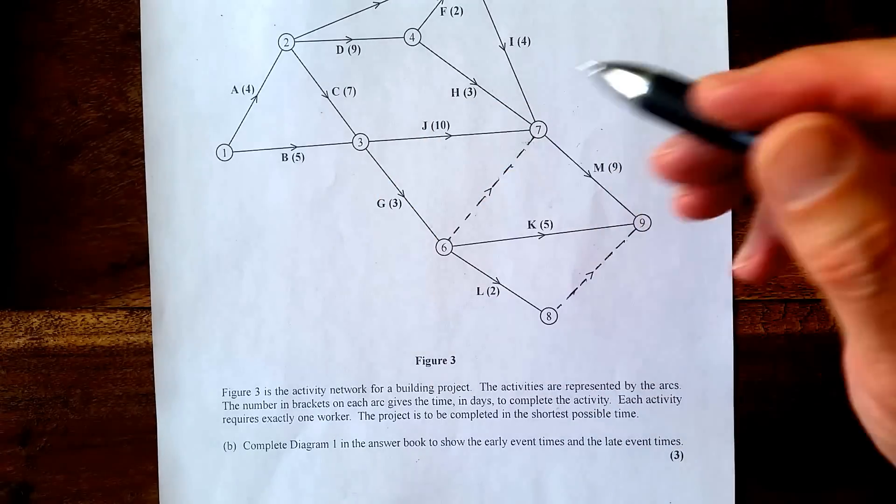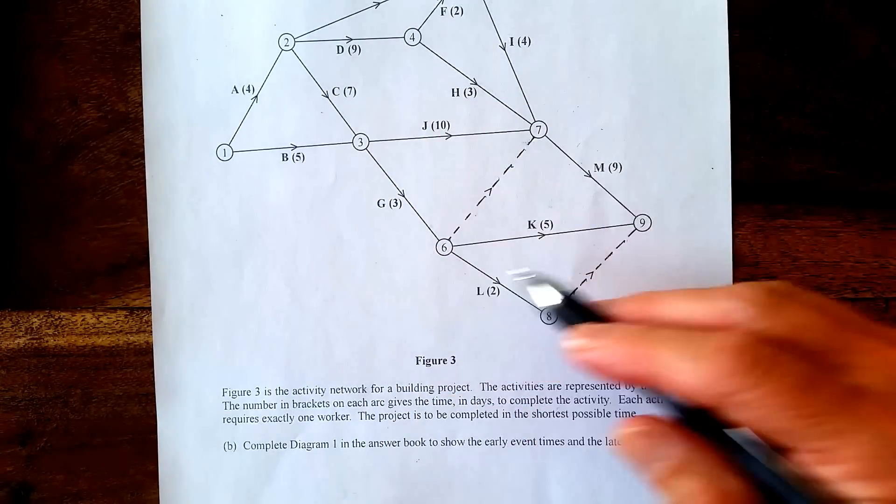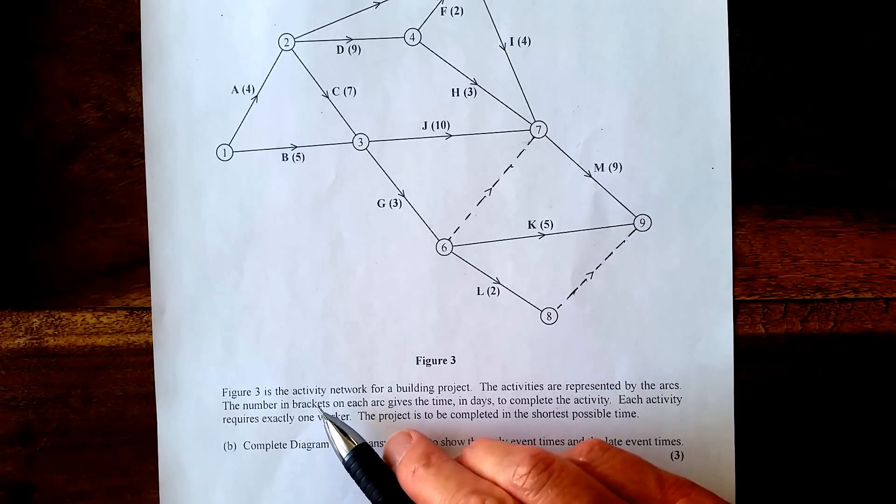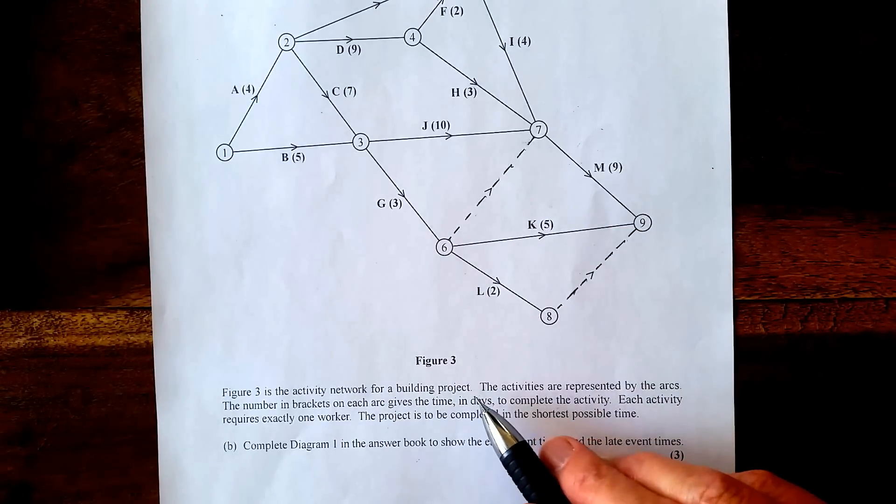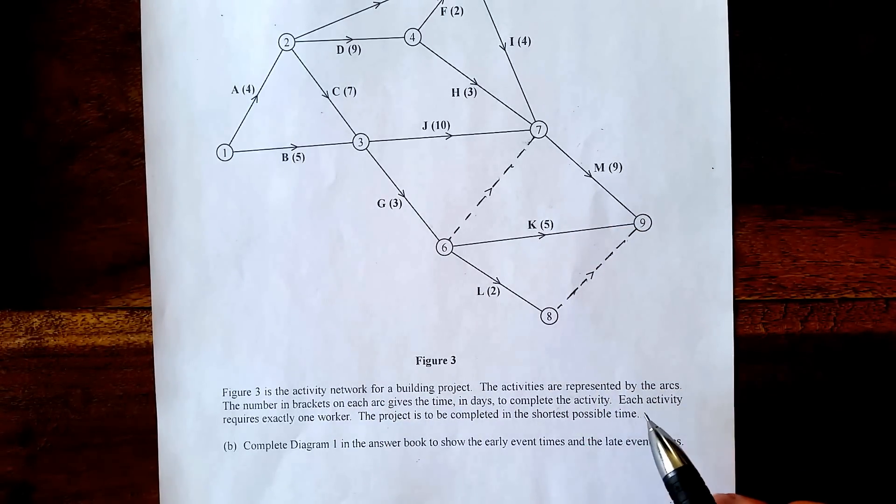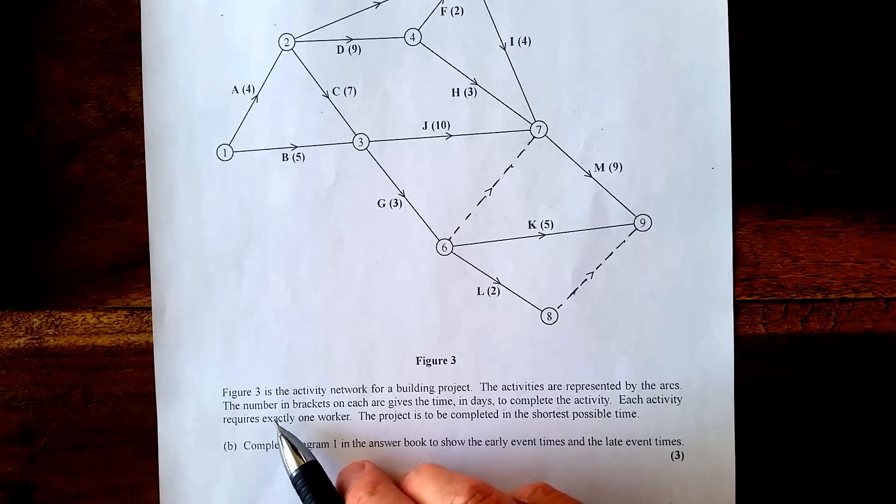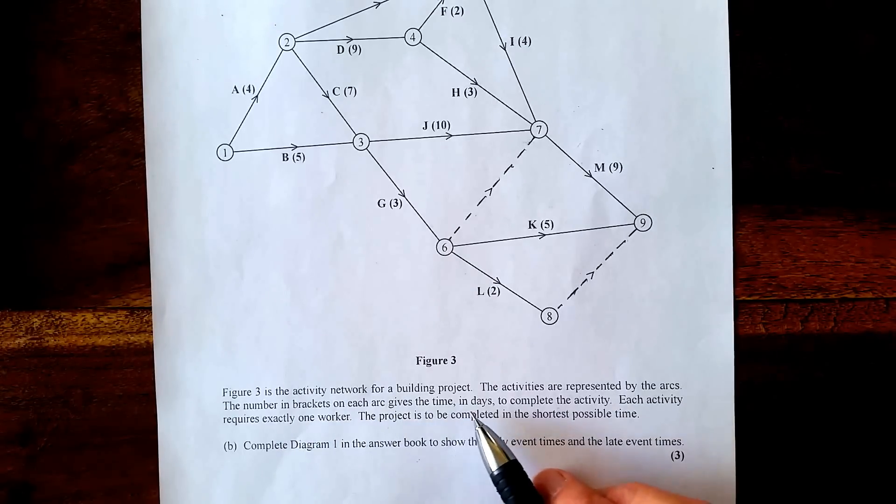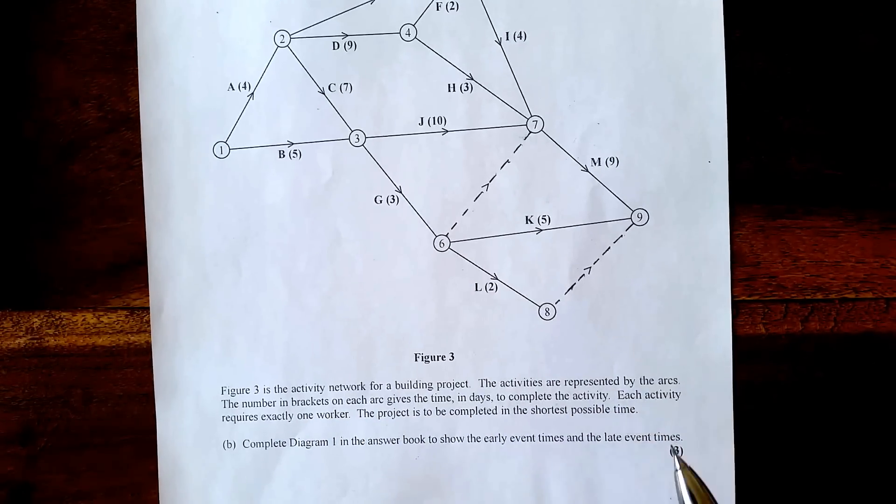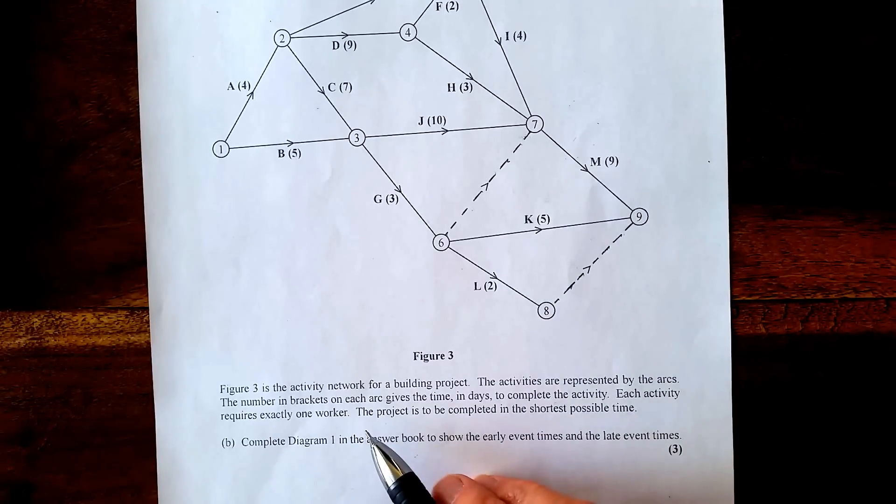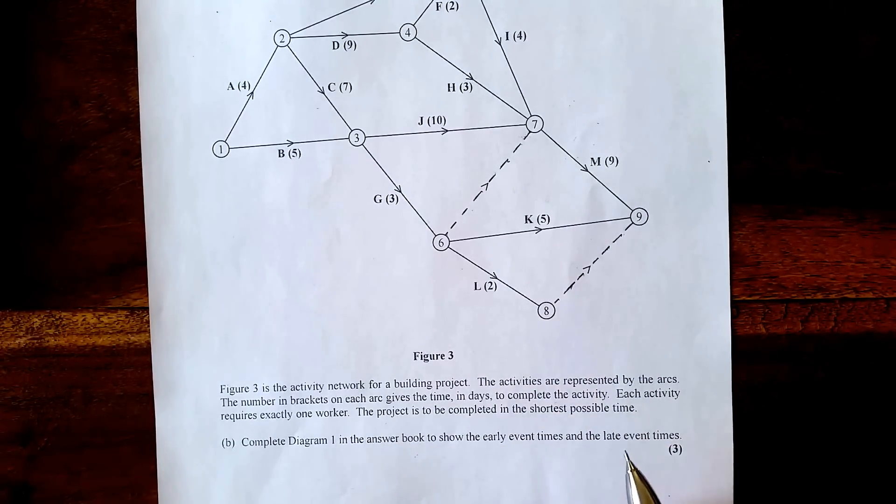Part B says it's an activity network for a building project. The activities are represented by the arcs. The number in brackets on each arc gives the time in days to complete the activity. Each activity requires one worker. The project is to be completed in the shortest possible time.